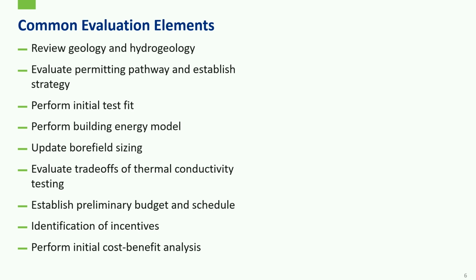I encourage everybody at this super early stage to have something like a plus 100 contingency factor on what you're estimating. There's just a lot of unknown unknowns at FEL 1, okay? We really don't know everything we're going to get into, and once you get a test well, it starts to remove some of that. But very early on, I'm a fan of plus 100 in terms of contingency, maybe minus 5. You don't see a lot of projects go under the initial budget, so I like to get people prepared for that.